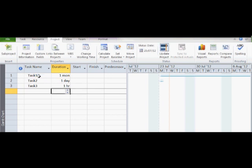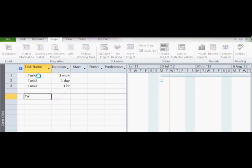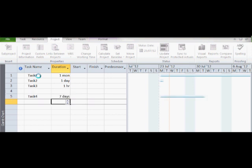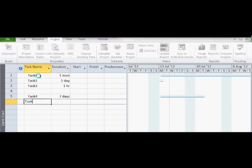In particular, it is important that you take notice of the difference between a normal duration and an elapsed duration. Take, for example, a duration of 7 days. If you look at the duration, you will notice that the task is assigned to 7 business days. Therefore, non-working days are not taken into consideration.